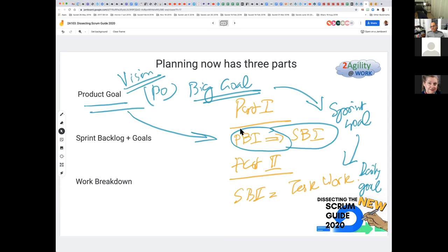And there are many of my teams who do not even do task breakdown. They know these are abstract sizes to do this work. This item is about 3 days, this is about 4 days, this is about 6 days, this is like a large, that's like a medium, and these are the 4 things that we are going to do. And they start jumping in and doing the work. In as low as 10 minutes, we have done all 3 steps of planning and then proceeded to do the work. Again, context matters, and the practices that the team follows matter.